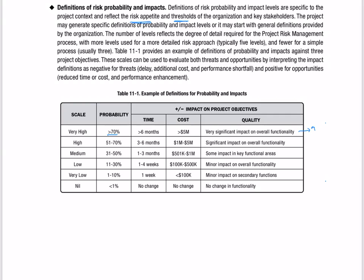Similarly, a high probability and impact is like 50 to 70%, and then the values are given as three to six months and a dollar value of $1 to $5 million — a significant impact on overall functionality. And then you've got the medium, low, very low, and nil categories.